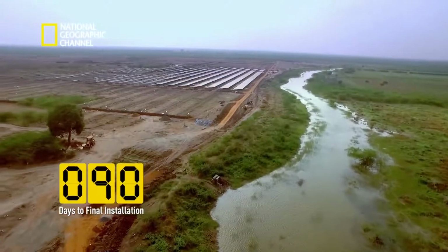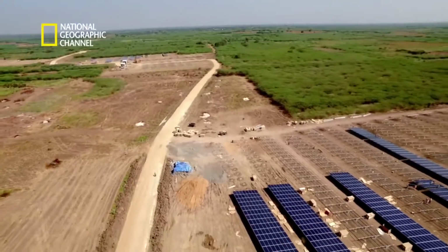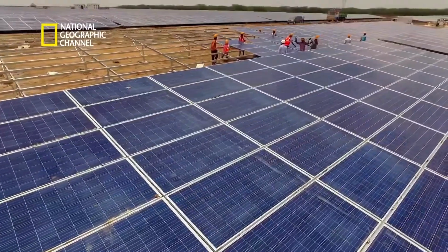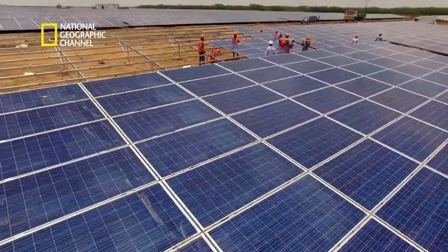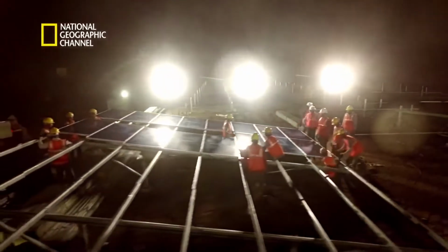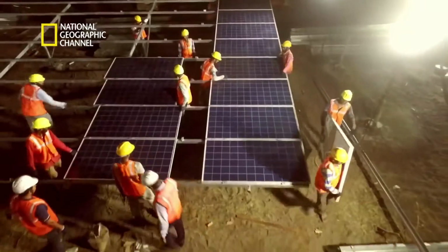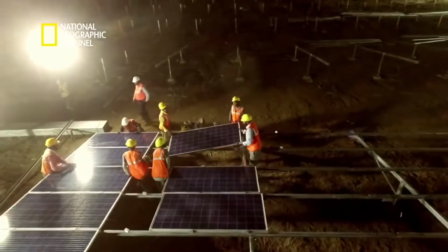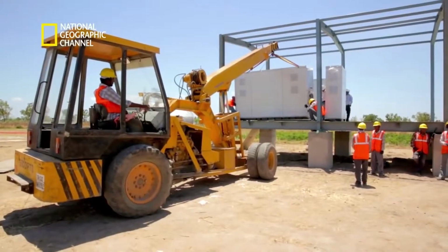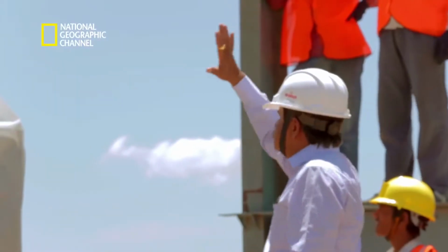2015 ended up on a terrible note for the ambitious solar power plant. Almost at the point of giving up, the team had got a second wind and plunged themselves into work. The personnel on site had to install 126 megawatts of solar modules in January. With a round-the-clock attitude, they punched in 163 megawatts. But the engineers were struggling with their inverter deadlines, barely installing 40-odd inverters when they should have done 112 in January alone.